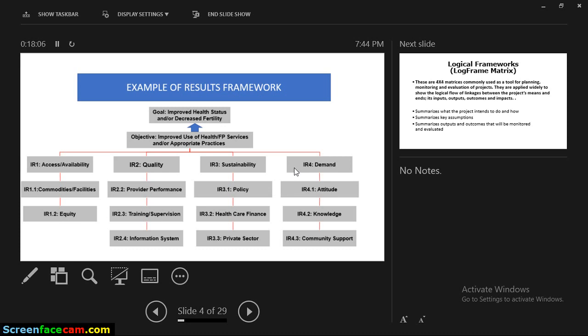And for those of you that are doing project management, and for those of you that have done project management, you will agree with me that when you are doing the work breakdown structure, this is how you number things. Because you are going to have the project there, then you are going to have your activities, then the task, then the final level is called sub-tasks. So if this is your task, then whatever you have here, you are going to number them like this, meaning that this thing is going to come earlier, then this will come after this example. Then this will come after this example. This is how we number this thing. I don't know who invented that, but that's how those things are supposed to be numbered.